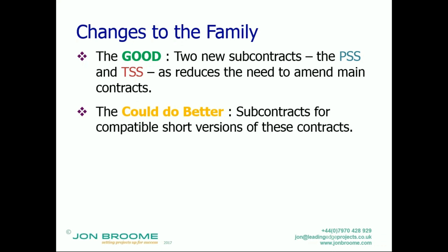And that applies both to the consultant or the contractor under the term service contract, as well as the subcontractor. And what happens is both parties end up in breach, and that's fine while it works and the project's been delivered successfully. But then when it isn't, you end up with a big ball of spaghetti to unwind. So I would like to have seen subcontracts with compatible timescales, etc., to the main contracts.